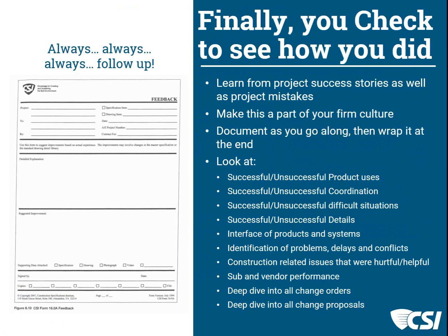And my specificity in a final inspection would be, this is non-compliant. We talked about this. Let's walk over here and look at what the example was where we discussed it. And you can see out of plumb, out of level, this is no good. It's got to go. Or it's rejected and the owner wants to see a credit for it. Now, that describes a little bit of me not doing my job, because had I been observant and covering enough ground, perhaps that non-compliant work wouldn't be in place. And I could have saved us both from having to go through the process of redoing it. But I'm not sure if that answers the question, but that's a swing at it anyway.